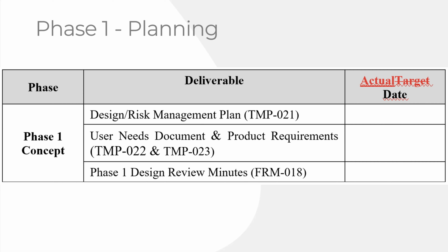It basically says these are the documents that were reviewed, these are the people who attended, this was the date and time it occurred, and here are the action items that are remaining, and you highlight any things that should have been done that weren't finished that carry over into the next phase. Every single time you do a design review, we call this a phase gate review.